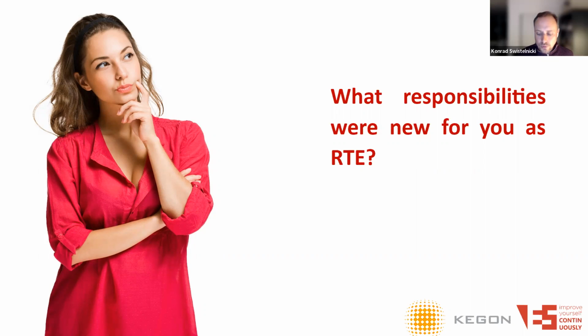It's very useful, when we start to talk about goals or objectives, to think from a business and product perspective. By implementing a particular functionality or feature, what will our product be able to achieve, or what will be the value that we provide to the business? And if we look from the business, end user, customer perspective, what do they gain by achieving something? Then it's easier to describe the objectives, at least on the team level, and then the role of the RTE would be to synthesize the objective for the entire Agile release train based on the objectives of multiple teams.